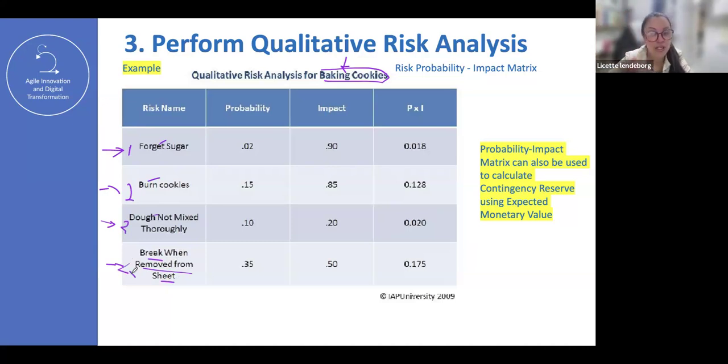Remember that you need 3 things. You need to analyze now the probability. This is the event. Now you need the probability and the impact. So who's going to provide the probability? Anyone? If you're speaking with the baker, the expert, who's supposed to give you these inputs? Anyone? Who? Any volunteer? Let me know. Don't leave me alone. Me dejen sola. Who is supposed to give you the numbers, probability? Remember, this is subjective. It's subjective, absolutely. From 0 to 1, the probability is 0.02.